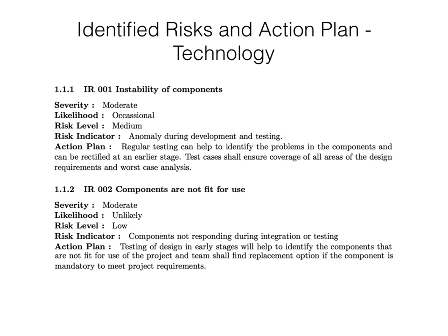Second one is components are not fit for use. This is a low risk, because the likelihood of this happening is very unlikely. How to identify the risk is by the risk indicator that the components might not be responding after integration.